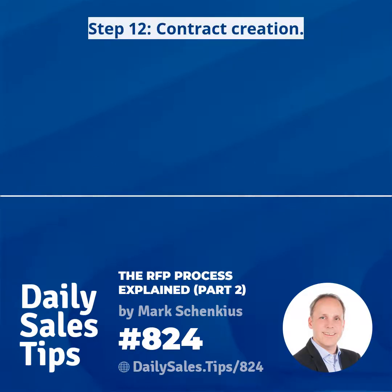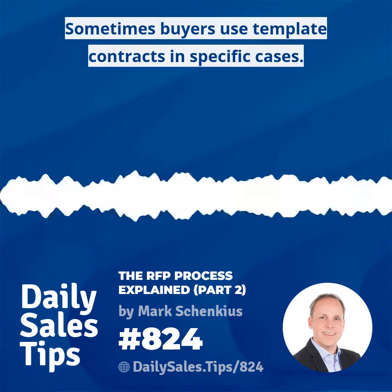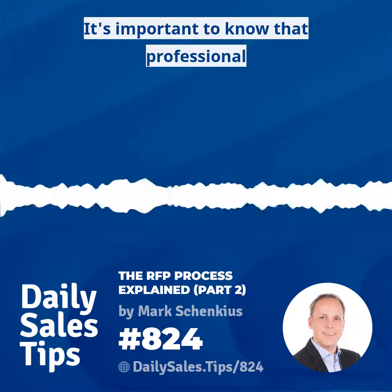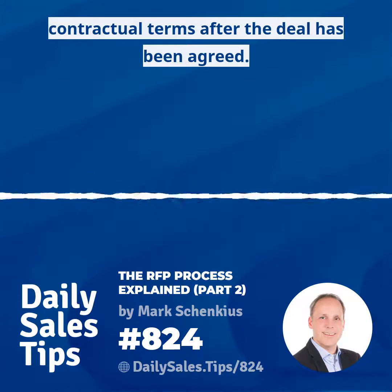Step 12. Contract creation. In the background, all the contractual requirements are put together. Sometimes buyers use template contracts. In specific cases, the contract will be tailor-made. It's important to know that professional buyers send a contract beforehand, so they have more leverage to negotiate. It's harder for buyers to negotiate the contractual terms after the deal has been agreed.